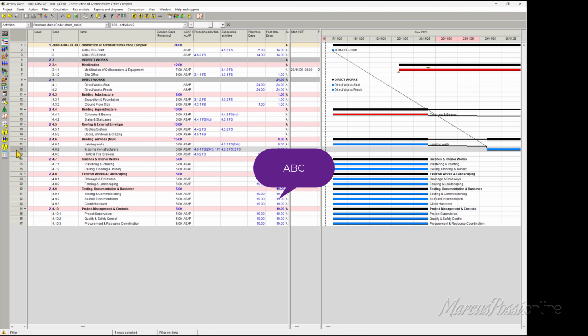And this activity must obey its calendar time, and they do not work on Saturday and Friday. But your painting or your drying time is being kept here. Did you understand that modeling? You don't find it in Microsoft Project. Microsoft Project uses the calendar for the lag according to the activities' calendar. You cannot model this kind of thing.